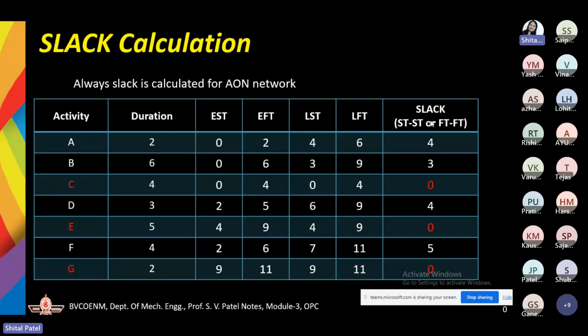So you can manage simultaneously 4 to 5 projects, depending upon the slacks. So the basic meaning of finding the slack is to share the resources. If you are working under the project department, then you are the resource for that particular company, right? So now this resource is going to be shared by various projects. Am I clear with you?